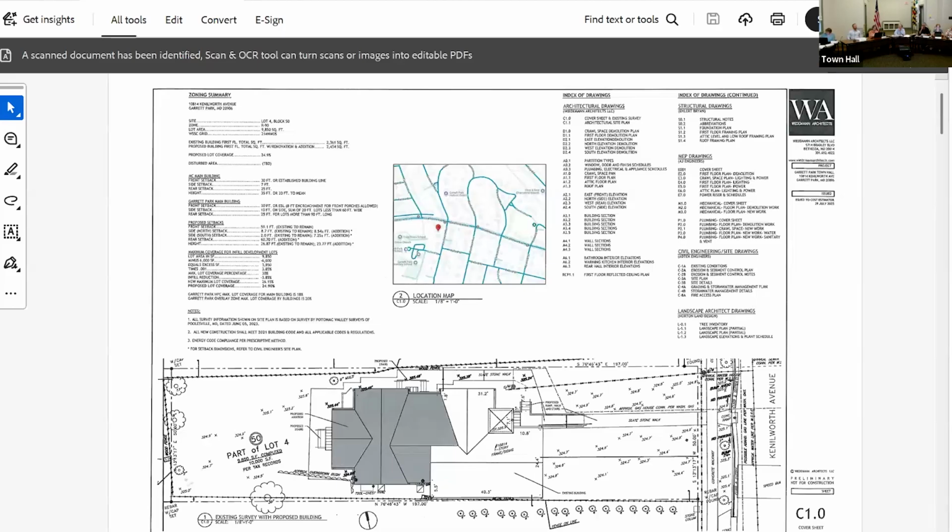So on the 29th of July, we put together a set of documents, which I understand that you've seen. And this is the cover sheet of that set of documents. It lists demolition drawings, partition types. The cost estimator does calculations based on individual wall types. So we did that, door, window schedules so that we can get a firm price on windows and doors. And of course, floor plans, elevations, and then representative, thank you.